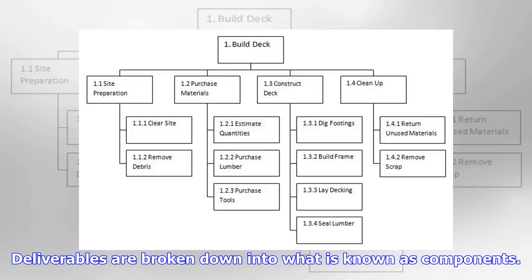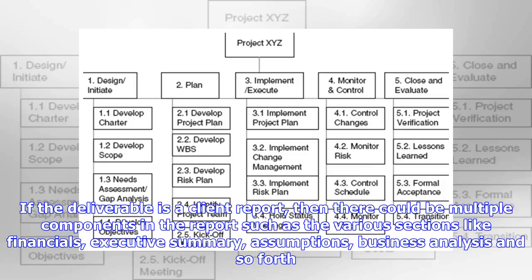Deliverables are broken down into what is known as components. If the deliverable is a client report, then there could be multiple components in the report such as the various sections like financials, executive summary, assumptions, business analysis, and so forth.